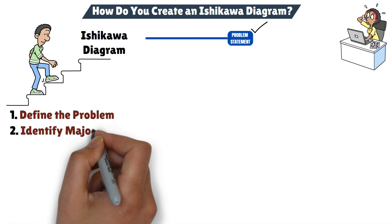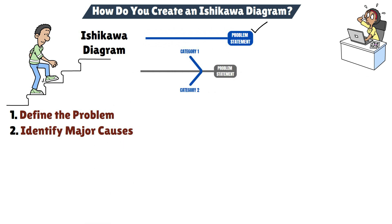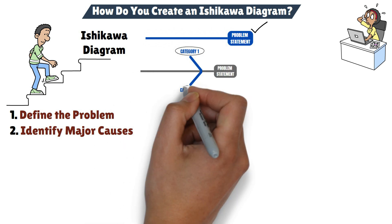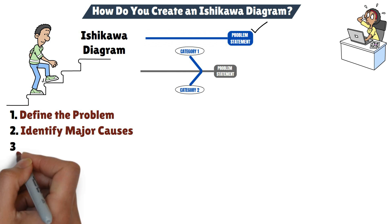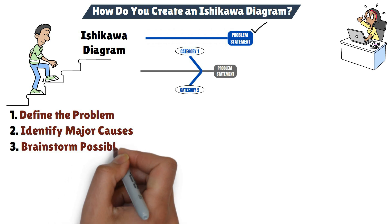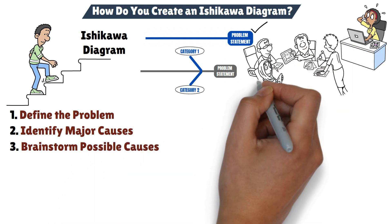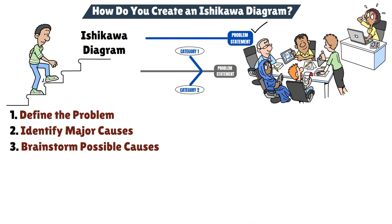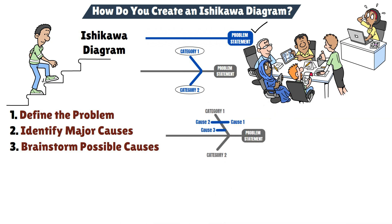Step 2: Identify major causes. Next, identify the main categories of causes — these will be the larger branches coming off the spine of the diagram. Use categories relevant to your project to ensure you cover all potential areas. Step 3: Brainstorm possible causes. With your categories in place, it's time to brainstorm possible causes for each category. Ask yourself and your team what could be contributing to this problem in this area. These causes will be represented as smaller branches off the main categories.